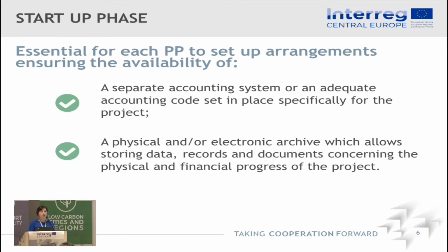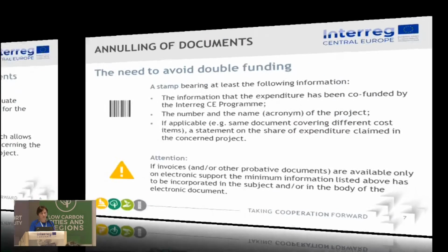There are different requirements in different countries. Sometimes the requirement is to keep all originals or certified copies, but in some countries you have just an e-archive, an electronic system. Either you are scanning the documents and keeping them somewhere, in which case, if you have originals, you need to really pay attention that the scanned documents are the same as the originals, or you have just an e-system, and in this case, you need to remember to fulfill all security standards and to ensure that this e-archive also fulfills the national requirements for storing the documents.